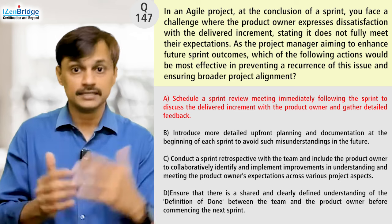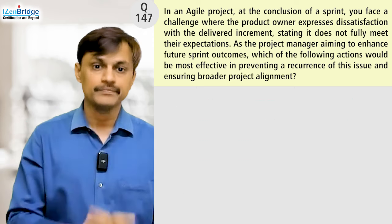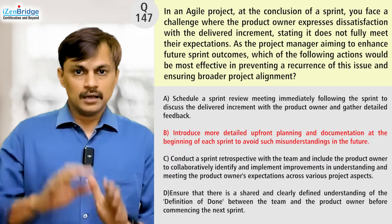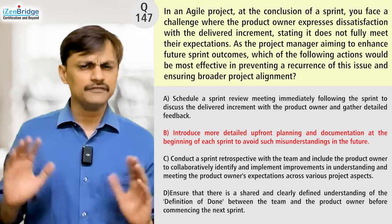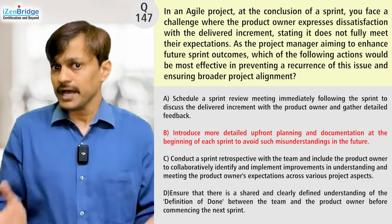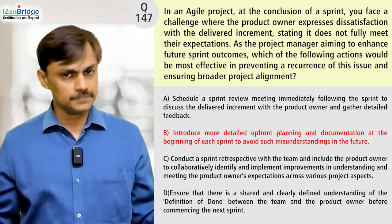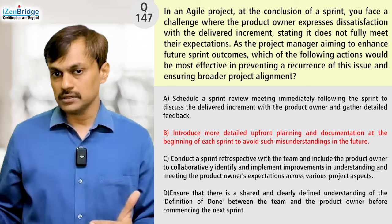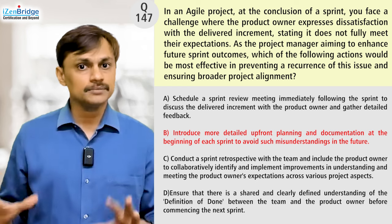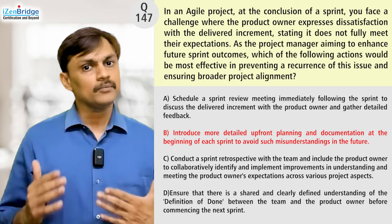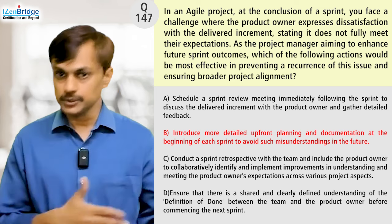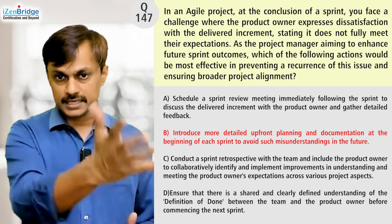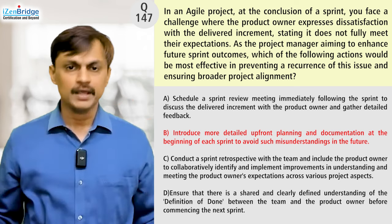This question is primarily checking whether we understand the difference between sprint review and sprint retrospective. Option B: Introduce more detailed upfront planning and documentation at the beginning of each sprint to avoid misunderstandings in the future. Detailed documentation generally shows an anti-pattern of agile. Even in a hybrid approach, it might help — but how do you know that's the only solution? There could be more frequent feedback meetings during the sprint, or we could agree on a definition of ready. So detailed documentation is negative anyway, and there are other reasons to avoid jumping to B.